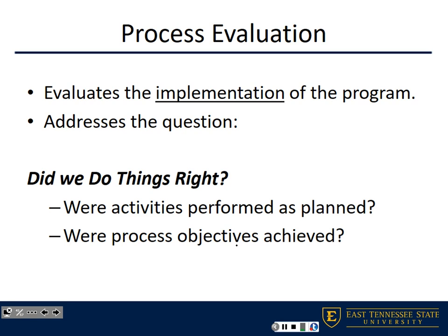So when does process evaluation then occur? Before we implement the program, during program implementation, or after program implementation? During program implementation. Okay? A common form of process evaluation is auditing, internal auditing. So every month, the program director should really be revisiting their work plan. Are they progressing? Are they implementing those activities, again, consistent with the timelines within the budget? If yes, great. If not, why? Why are there delays? Why are there gaps? What can be done to correct that?